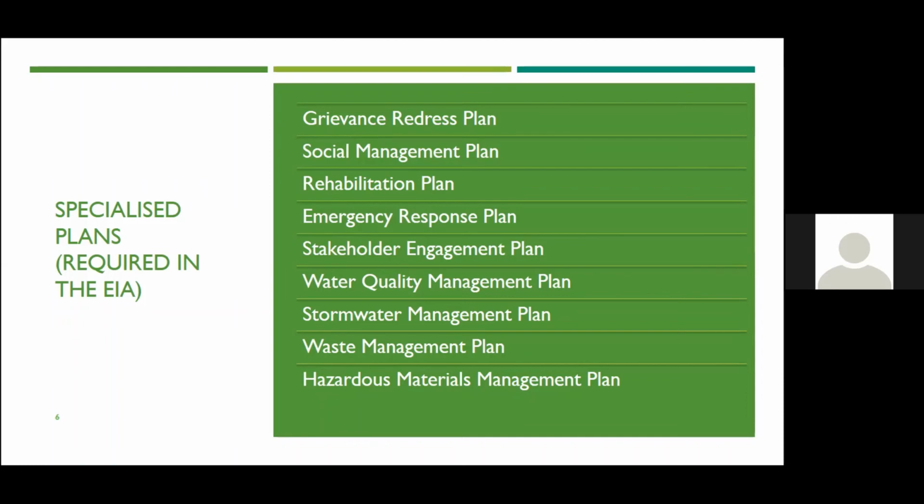The waste management plan will describe the procedures for the storage, transport, treatment, and disposal of hazardous waste and non-hazardous waste generated during all phases of the project. And the hazardous materials management plan serves to identify all types of hazardous waste on site. It will describe the storage and holding methods and describe the final disposal of each type of waste.